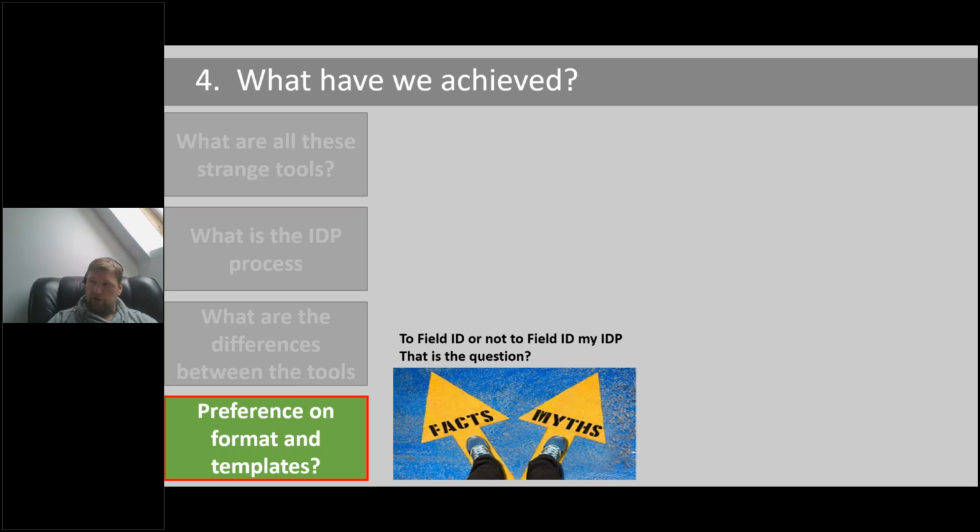Usually, and the way the ISO states, you've got to do this before you go into appointment. And then obviously you update it as the project evolves. Now, if you answer it is easy, then I'd love to know your secret. And I'm sure many of us would too. And it's primarily because defining a specific designation, set of designations, including the unique ID at the end, at a very early stage, is extremely challenging, because you know that you've got to hand over some information, but you don't know exactly yet how it's going to be presented. And that's one of the things that the guidance tries to touch on.